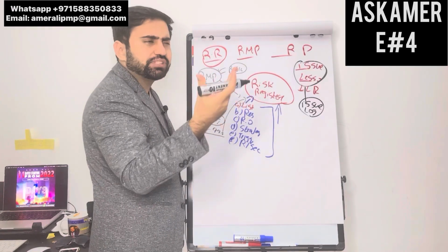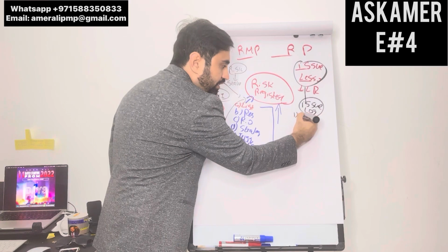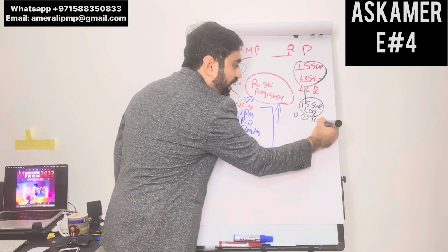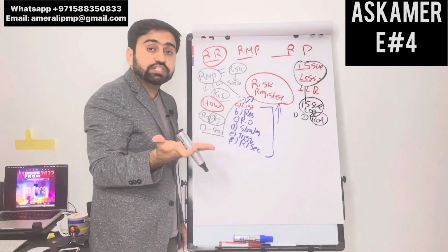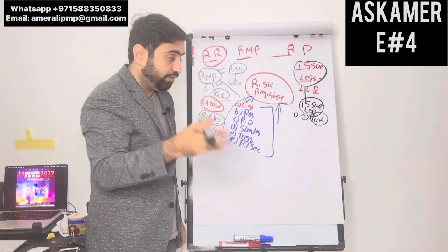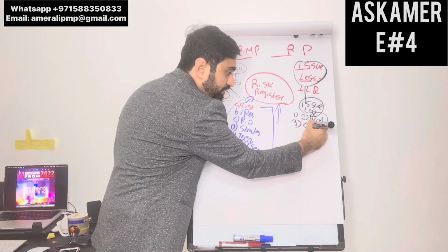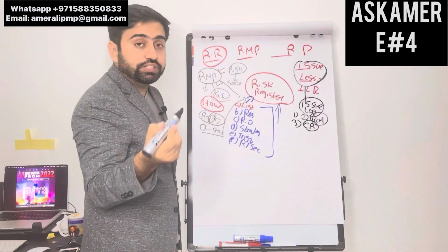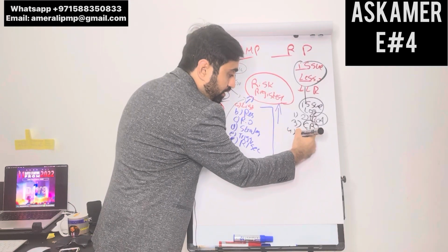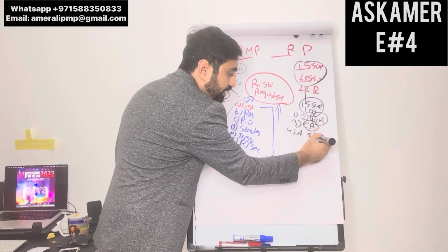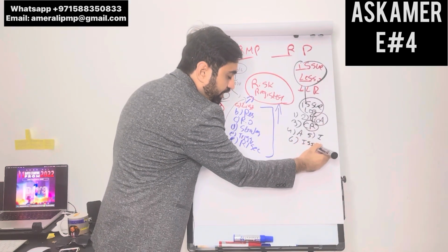Now I'm going to give you the steps to handle those issues. You put it into the issue log, first step. Then you do the root cause analysis, like why it was not identified before. Something has happened, which means you missed it. Then you see, do you need to raise a change request? If you need to raise a change request to handle that issue, you raise it. Once it is approved, you implement it, update that the issue is solved, update the issue log, and communicate it.